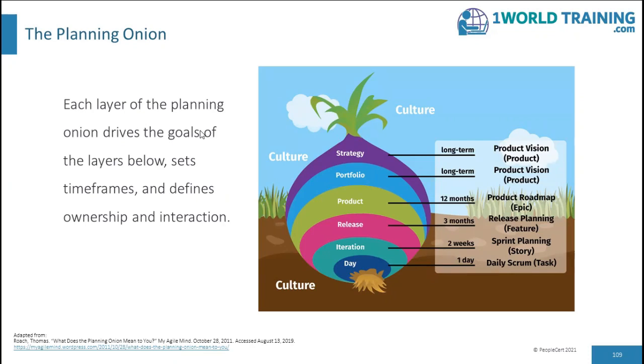The revelation of changes and/or progress deviation at all levels allows the Scrum framework to make necessary changes and adapt to the new reality. A third dimension to the planning onion illustrates the frequency of activity at each layer. At the top layer, the frequency between strategy generation activities is quite long, perhaps once a year. Progressively, the activities become more frequent and of shorter duration, down to the most frequent planning activity of day planning through the daily Scrum event.